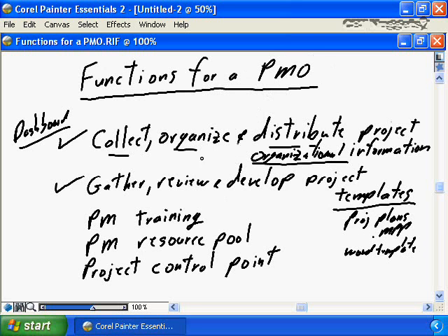go to the PMO, and the PMO would say, yes, our organization has done this before. Here's a template that has been reviewed, sanitized, improved, and certified to be best practice for our company. These templates are developed by the PMO, which consolidates the best practices across many projects, and for that matter, across many companies within the specific responsibilities that the template is being delivered for.